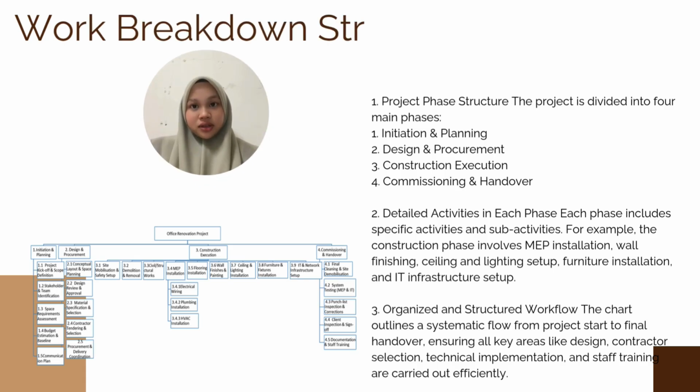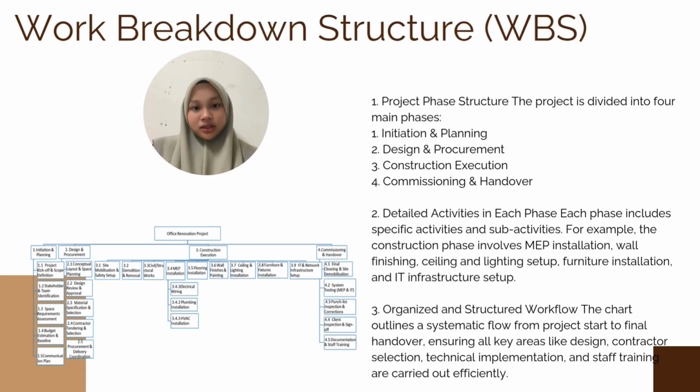Next, I will explain about the work breakdown structure, WBS. First is a project-based structure. The project is divided into 4 main phases. First is initiation and planning. Second is design and procurement. Third is construction and execution. And fourth is commissioning and handover.